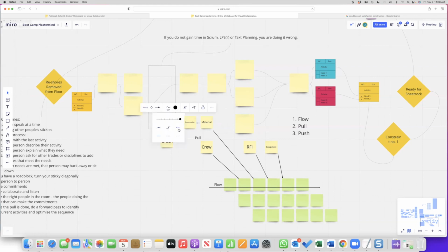So right now, with this panic around COVID-19 where everybody's ordering everything and they're like, we have to do it. Well, okay, if we have to play the game and do that, that's fine. More power to you. However, we don't bring it on site. So what is the exact date that we need to bring this on site and actually mobilize it in the on-site logistics? Going backwards will help you identify that date. Any other questions about pull planning?